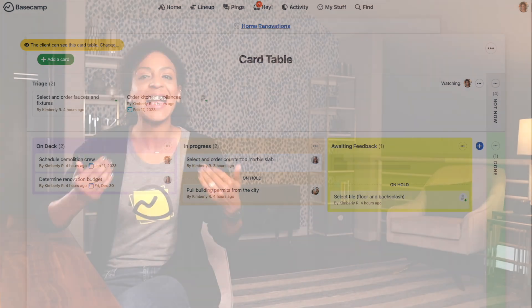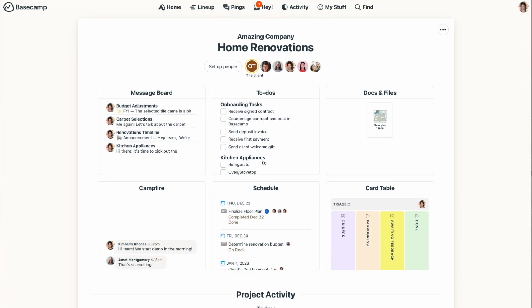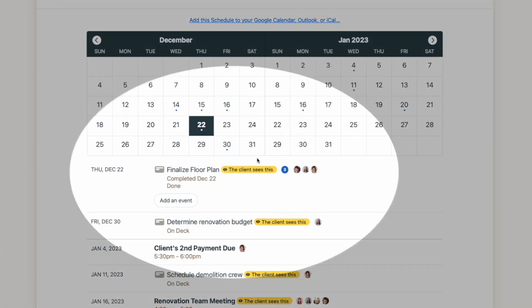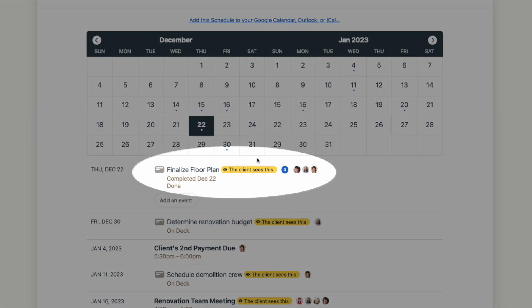One thing I personally love about the card table is that cards with deadlines also appear on the project schedule. You'll see the little card icon, and when you click on the item in your schedule, it automatically opens up the full card.